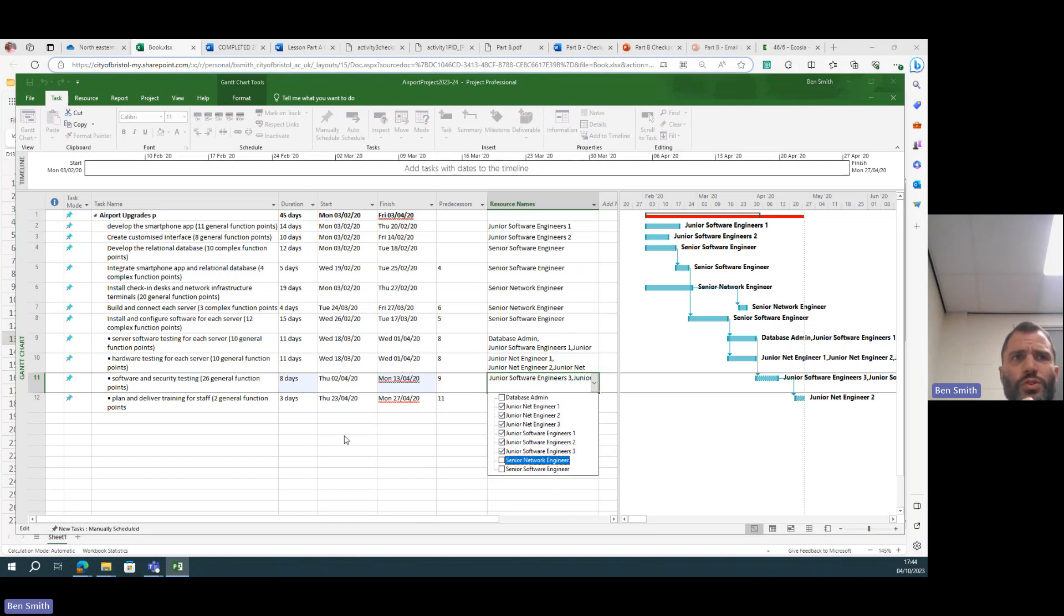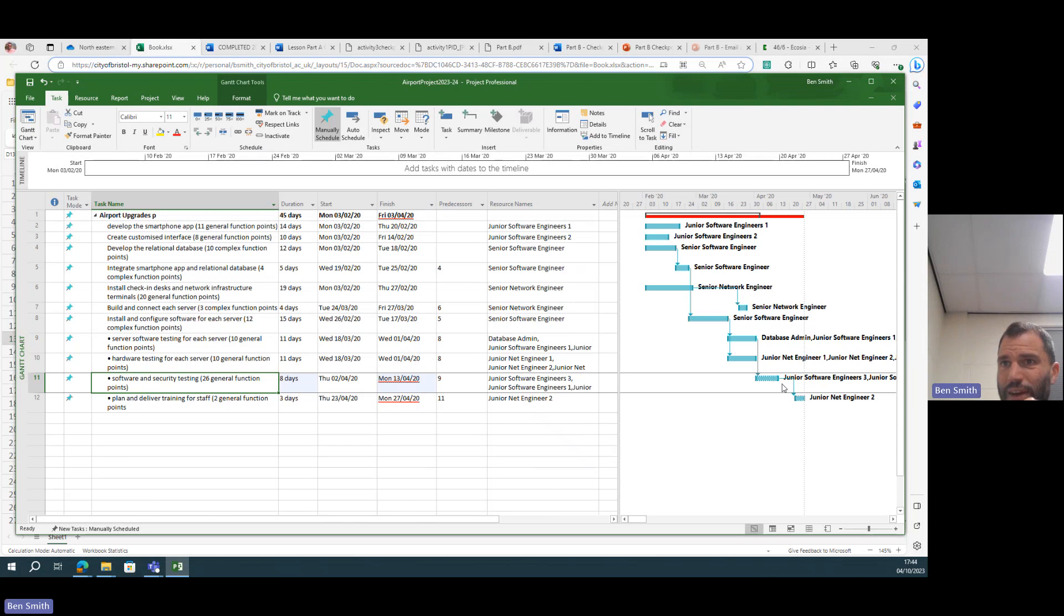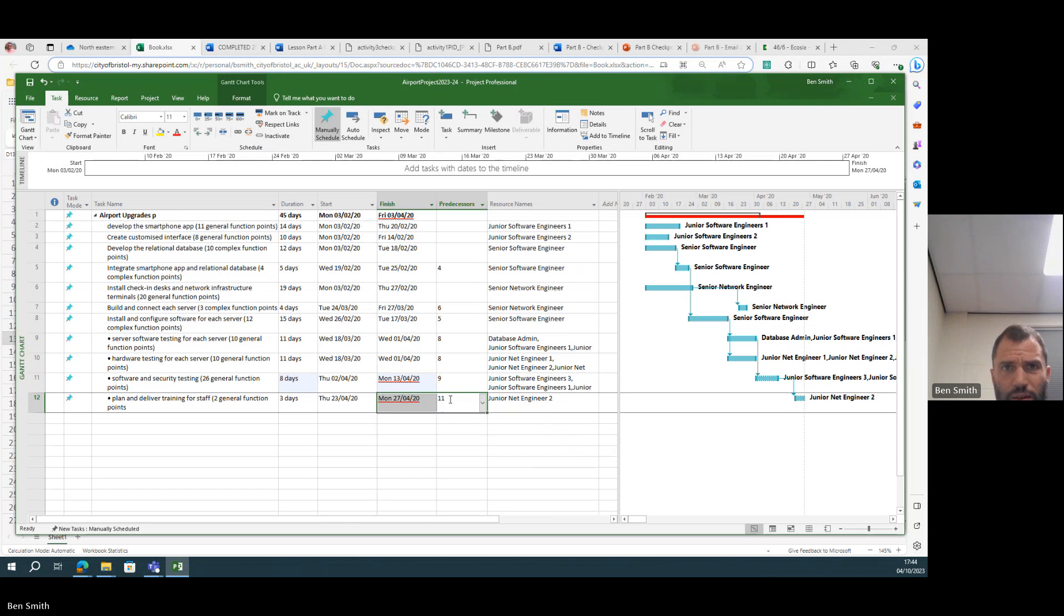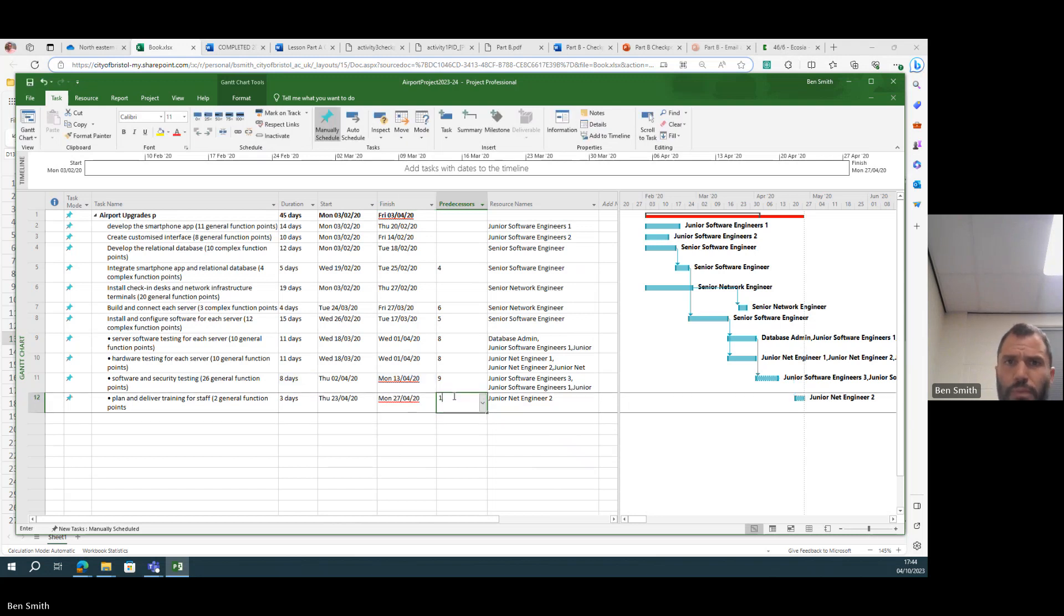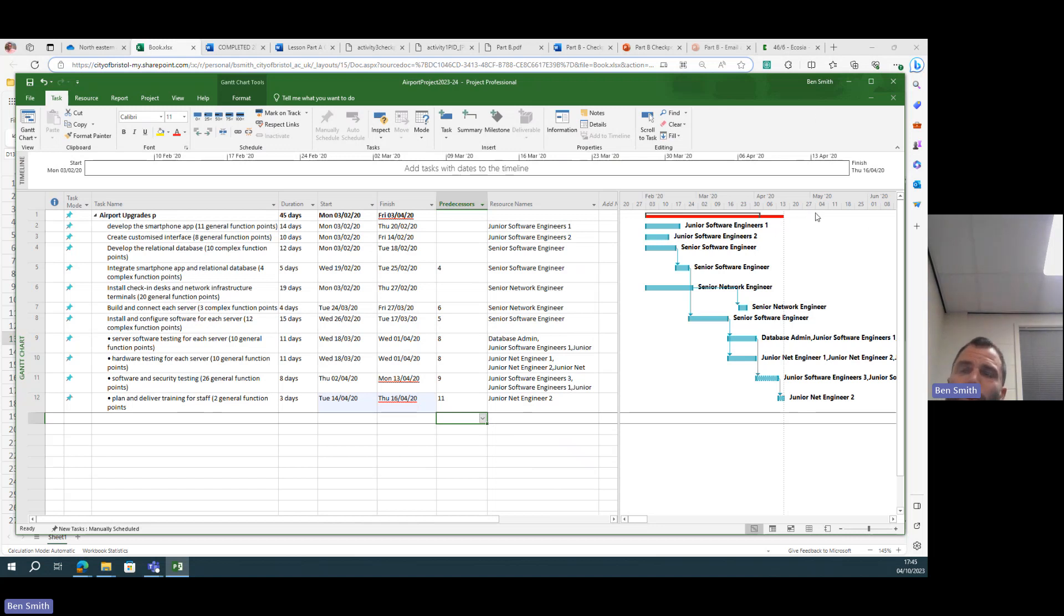Eight days. So now we've cut that 48-day task down to eight because we put like all of our junior resources onto this huge task, and we've almost allowed it to not overrun onto the project. But this last one here can't start until they've all finished on that one. We shift that along and now we're only going—okay, we're still going over by two weeks.